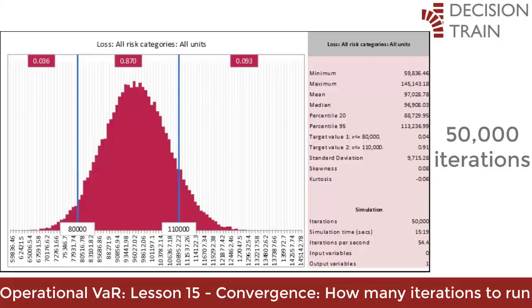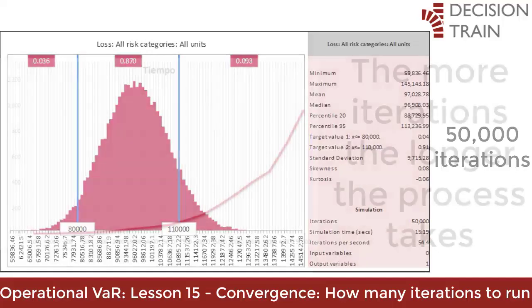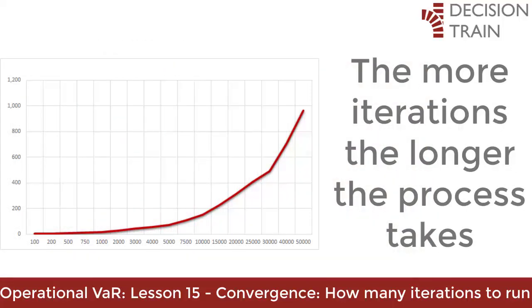The more iterations you add to your process, the more stable your curve, and especially your stats, will be. Some statistics like the mean and median converge quickly. Others, like extreme percentiles, tend to require more iterations to stabilize. However, the more iterations, the longer the process takes.